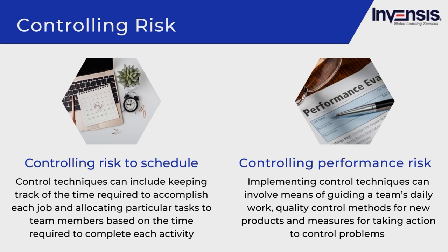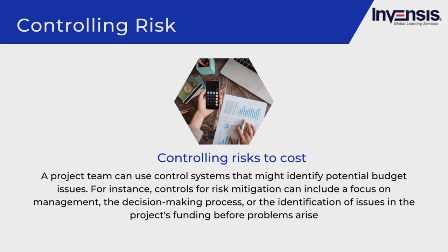Controlling performance risk might involve means of guiding a team's daily work, quality control methods for new products, and measures for taking action to control problems that could influence overall performance. Controlling risks to cost involves using control systems that identify potential budget issues — such as focusing on management decision-making or identifying funding issues before they arise — so the team can detect overspending in advance and take actions to limit it.